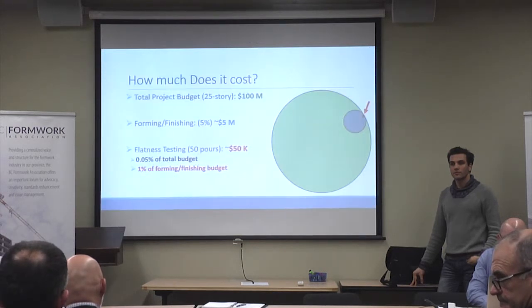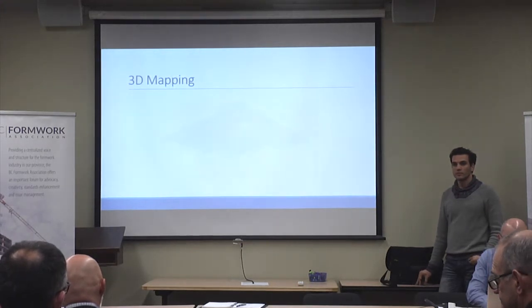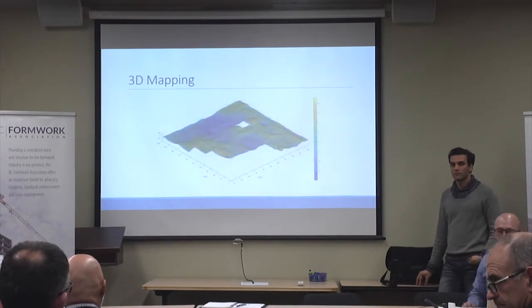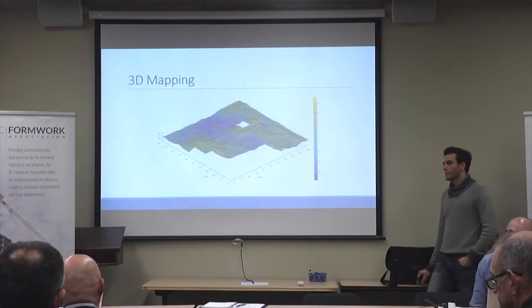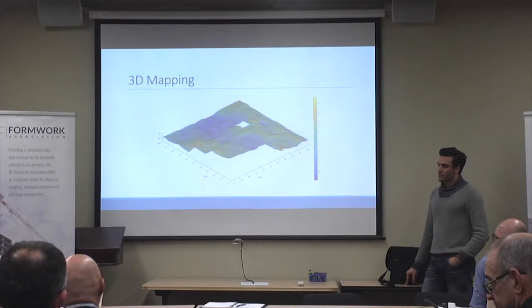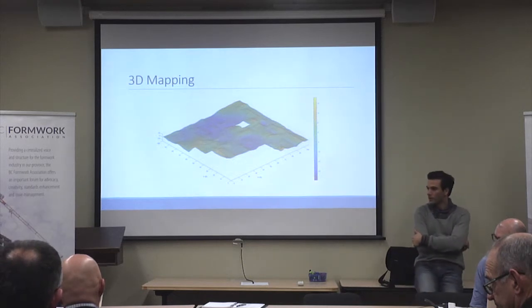So now, if we put a slot of fill into the center of a room to meet our spec, that puddle gets 4 times larger when the flooring guy comes in and does his prep work to get his tolerance. So now you have a laminated topping on top of the concrete slab, right? Not to that point, one of our recent negotiations, we actually said we'd like to come back to the flooring guys and give them money out of our pocket to take it to the tolerance they want for the finish we get.